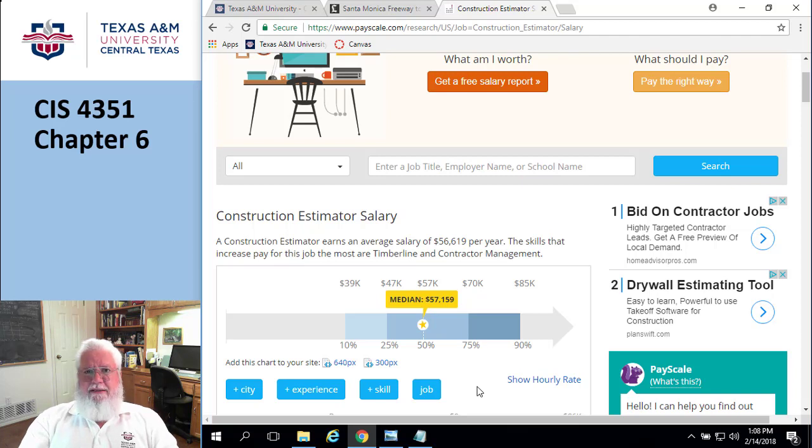All right. So, obviously, in order to pull off some of these durations, I need to know what the crew size is. I need to know how many carpenters we got. How many roofers do we have? Okay. So, on the next page, they talk about there's basically 3 different ways you can do estimates. One is a single point estimate, and you can say, it's going to take 5 days. Boom. And the other one is a date range. You know, you're going to say, I don't know, 5 to 7 days. So you don't give them exactly, you give them kind of a range to deal with. And the third one is called a 3-point estimate.